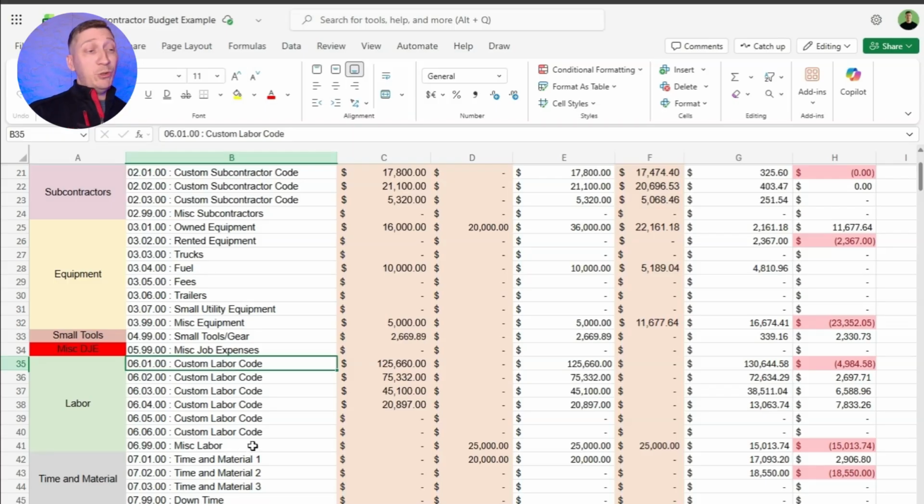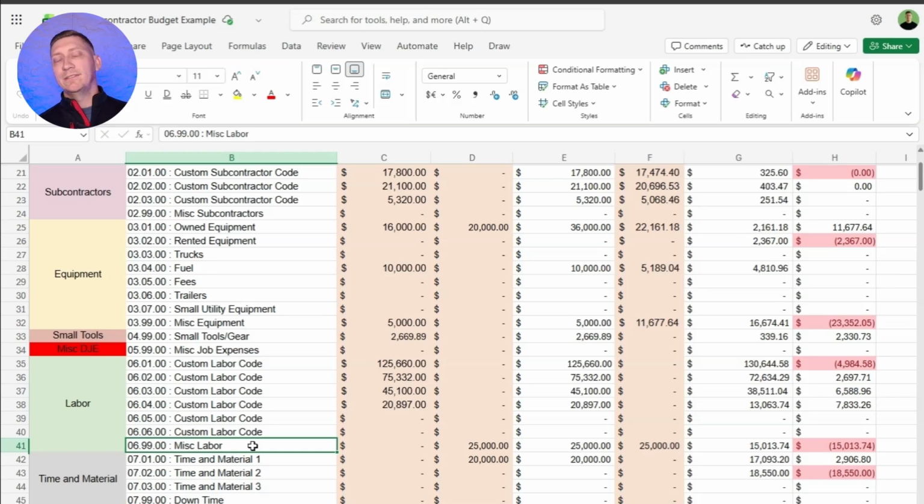And again, if you do small projects that are under a month, you're just going to use one cost code. It's going to be, in my opinion, just small project labor, miscellaneous labor, because you can't track things daily. You're not going to be able to reconcile it. Your bank statement comes out once a month. So we can't actually go in and say, hey, all of this happened this quickly. It has to be all within a month time frame.